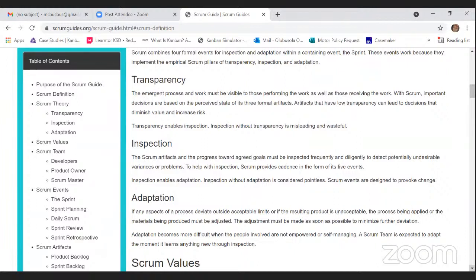The product backlog is the entire document that shows everything we're working on for the product itself. However, the sprint backlog is per sprint. So in this sprint backlog, we're working on this task in order to achieve creating the cover of the pen. The sprint planning is done when we've all agreed on the sprint goal and the tasks. Then we move to the daily scrum.